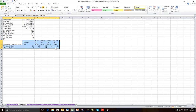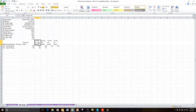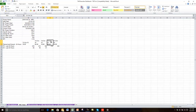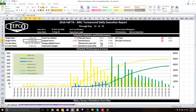Down here I have built in a time distributed section to the report. This particular time distribution is the data date minus 24 hours up to the data date, so it's a date range of minus 24 up to the data date. I'm also showing it in shifts here. For some reason, P6 always shows a couple of extra shifts above and beyond my date range. The date range I've set is right here — my data date is October 15th at 6 a.m. and I want to show 24 hours of data prior to that. Back in the MR1 dashboard sheet, this is what's used to calculate the last 24 hours planned and the last 24 hours earned.